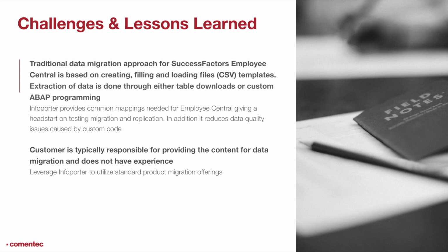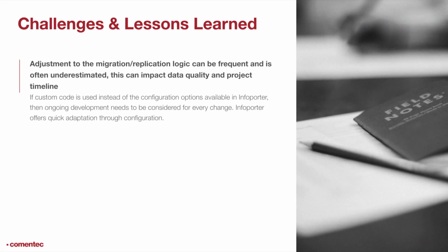It will definitely give you a large head start. On that note, throughout your implementation timeline, you will see that there will be adjustments that happen to both the migration and replication logic. And if they become frequent, the effort that goes along with that is often underestimated, how this will impact your data quality and project timeline.